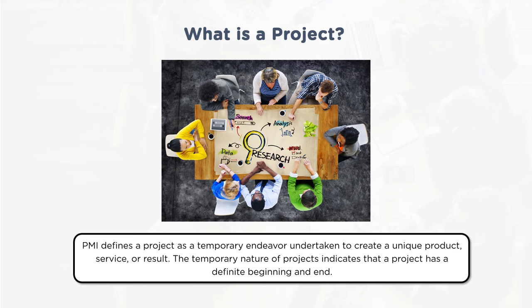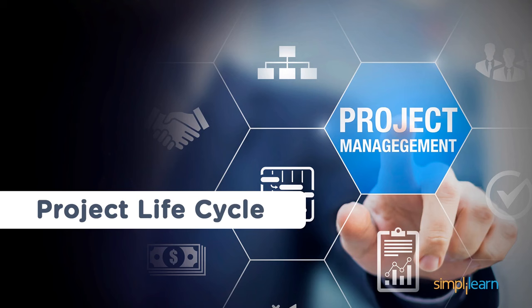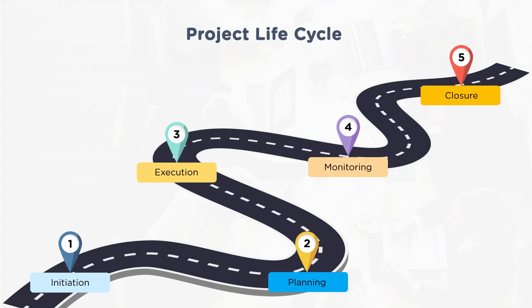Every project has a definite beginning and end — that is why it is temporary and not an ongoing business activity. Every project will have a life cycle. Interestingly, within a product life cycle or service life cycle, you come across many project life cycles. One project is initiated to introduce a product or service, the next to enhance it, then to optimize, and finally to retire it. So in a given product life cycle there may be multiple project life cycles.